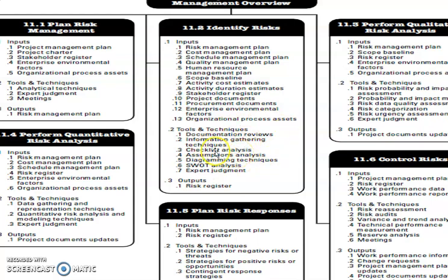Then what are the tools and techniques? Documentation review. All documents have to be reviewed to identify risk. Whether the risk is in budget, or due to some problem, a strike or something, the project is getting delayed. As time gets delayed, budget will also increase. So that's a risk. Time, schedule. Then resources, availability of the resources. Then availability of money, availability of materials or equipment.